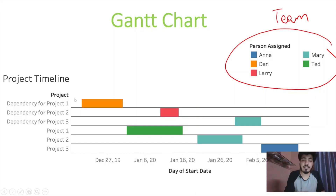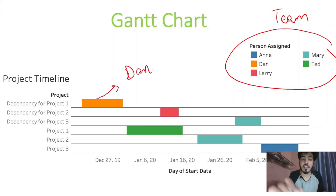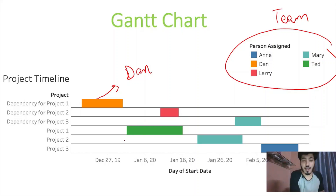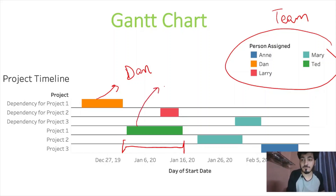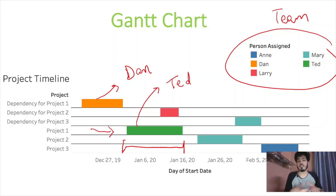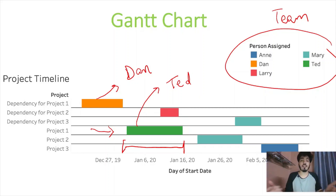If you want to see how project one's timeline looks, Dan is responsible for project one — starting from December. After completing his task, he hands it over to Ted. From first January it is handed over to Ted for the remaining work. This is how we interpret a Gantt chart, and it's very useful in an organization wherever you want to show a timeline.